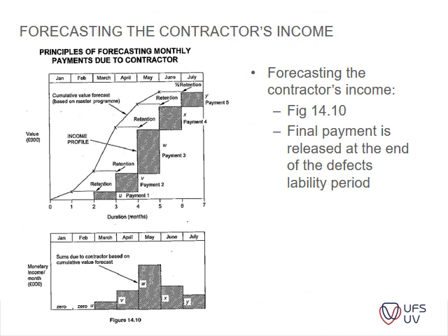Okay, so you've got your value that I've spoken about now. So we've done the value forecast, but now we're getting to a point where your actual cash flow inflow is only received after the first month. You will see that, like I've explained in the lectures, after you're appointed, you do your site establishment and ground earthworks and so on. So you already do work in your first month. In your second month, you put in your first claim. So for the amount of work that you've done here, you put in your claim.